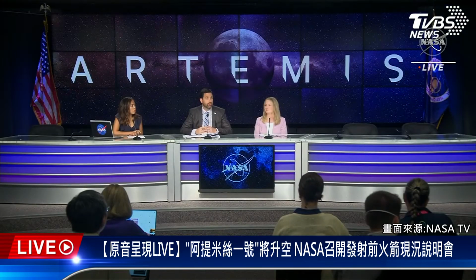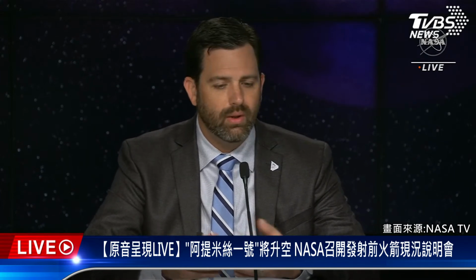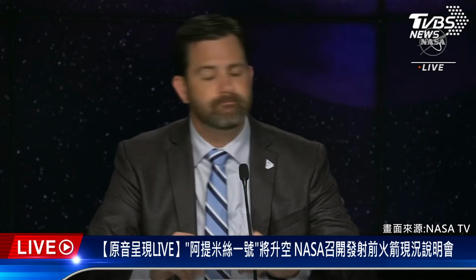Yeah, and to address your second question, it wouldn't necessarily be a minute-for-minute slip, and that's why we want to let the team work through it. They didn't reset the clock until the T-minus 40-minute hold yesterday, so there's not a lot of margin in the timeline. It's very orchestrated, but they may be able to deal with certain 15-minute delays, 20-minute delays, those sorts of things, and we'll try to make up time as they go through. But I would just say there's not a lot of margin in that timeline.